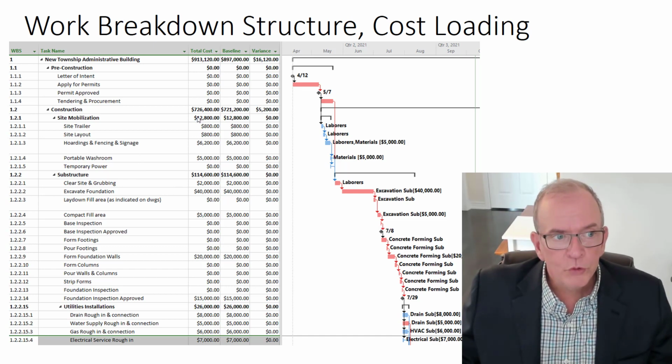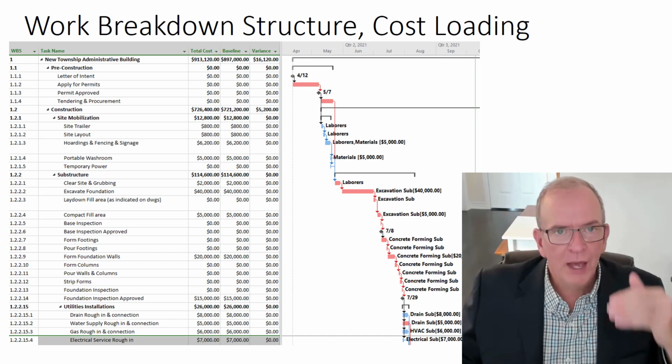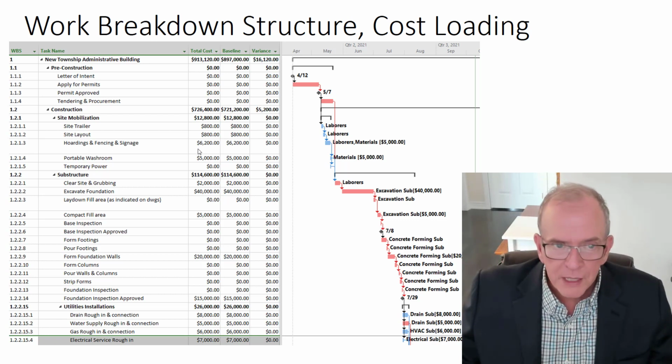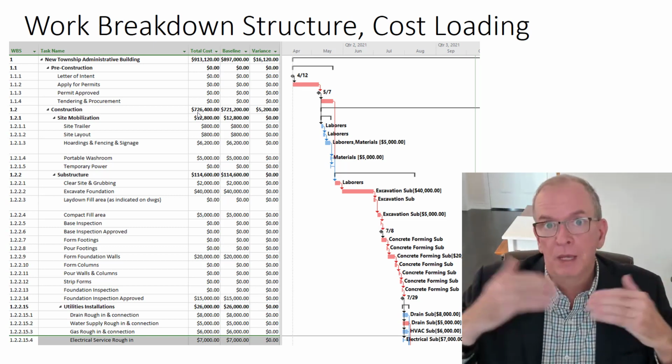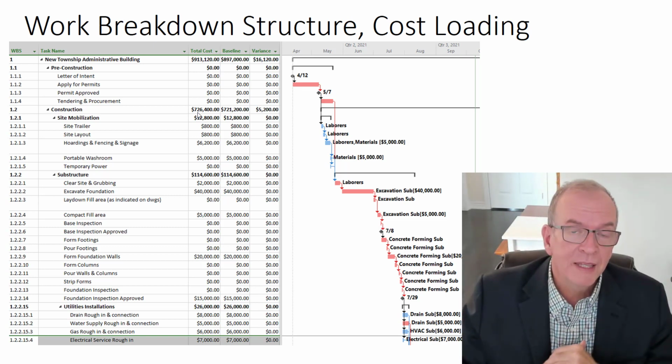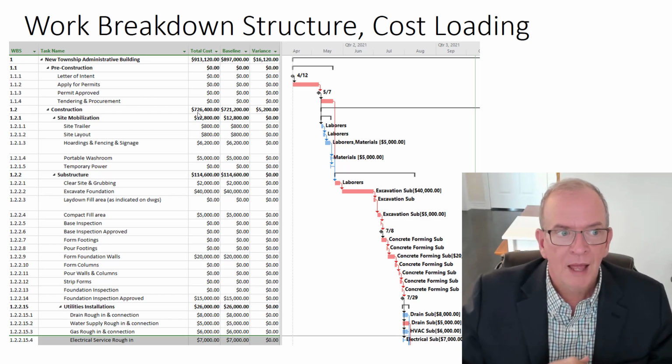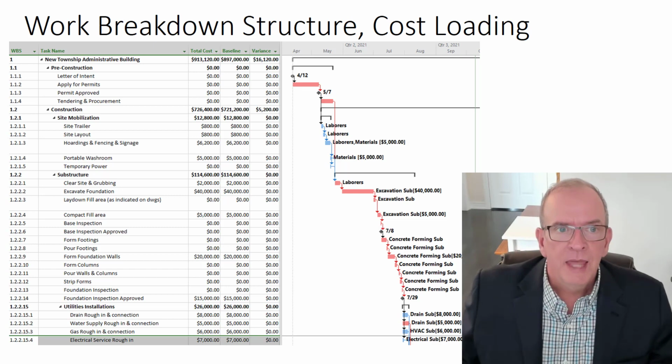and then those costs get rolled up to the next level, which we'll look at in the triangle and how that can be associated. Now, contingency costs could be applied at the activity level. They're probably applied at a more higher level and then as maybe a total of what's been identified, but that can be done in different ways. And perhaps that's for another video discussion. But essentially though, that would come under your overall project budget.